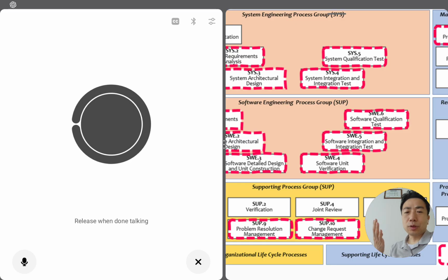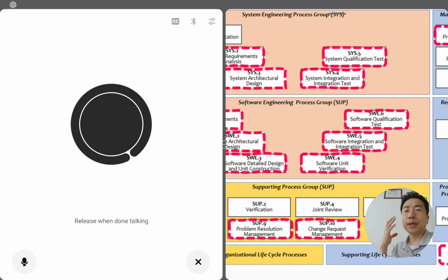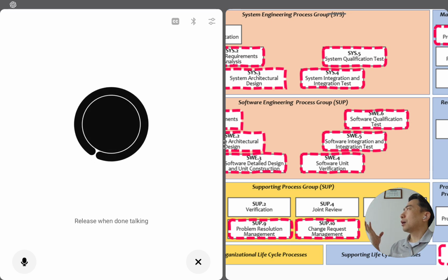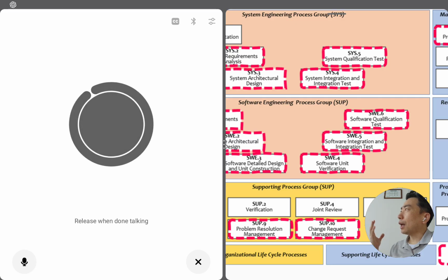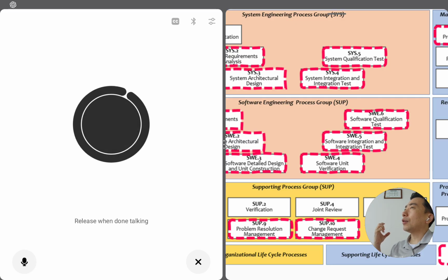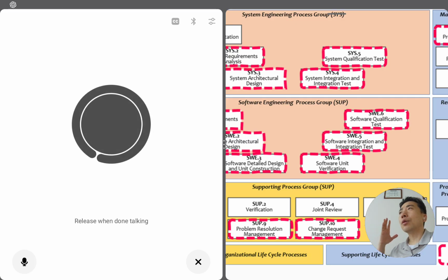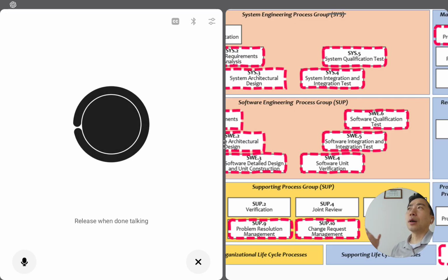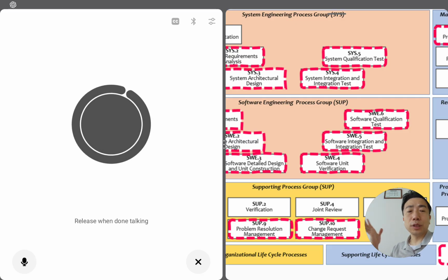GPT, you know what? Sometimes we confuse the difference between resolved and closed, but it's different. Closed means the issue was cleared and every following process is cleared, like DFMEA or PFMEA or the lessons learned process, all cleared with the issue.